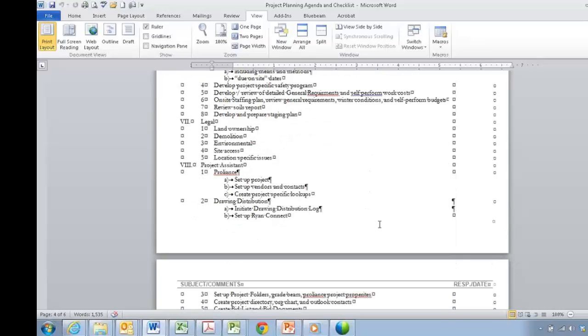On the legal side, a lot of times where the developer comes in, it's about what's coming with the land. I believe we've all been through that before, understanding our due diligence efforts with environmental reports, wetland studies, historical, endangered species, you name it. The bottom line is that has to be identified up front. And quite frankly, if you're at a kickoff meeting or a planning session, you're going to design, you need to have resolved all this already, or at least know where it stands and where it's going. If you're kicking off design and these are still open for discussion, it may already be too late.